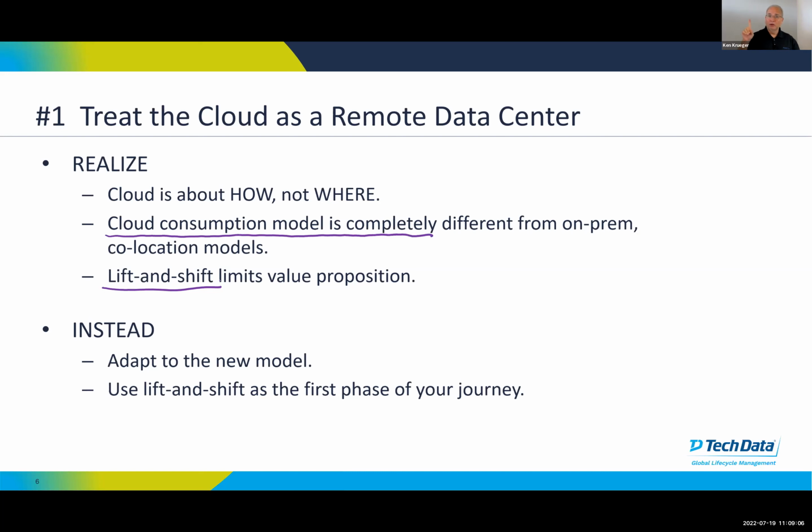That's just phase 1. But when we do it, we know that we're not going to be optimal. We know that we're not going to be achieving everything that we could be achieving. And we know that our total IT spend was probably going to be more than what we're doing right now, which leads us to phase 2, where we're going to go back and optimize everything. And I thought, this is the most beautiful plan in the world because everyone in the organization, even the janitor, can understand that plan. It's just so simple. And that's exactly what they implemented, and they achieved a lot of success.